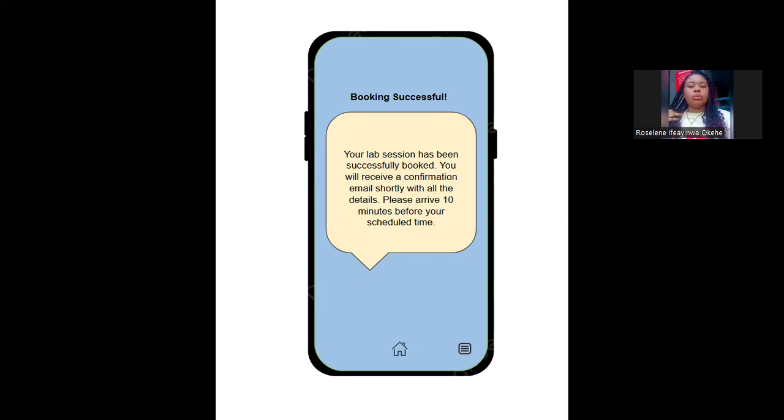And the solutions: in future projects, we will assign story points to each subtask during sprint planning, ensuring that each component of a screen is estimated individually. Additionally, we will add at least a 10% buffer to the sprint schedule to account for unexpected challenges such as debugging and design adjustments. This approach will create a more realistic timeline, reduce stress for us as a team, and allow for higher quality work.